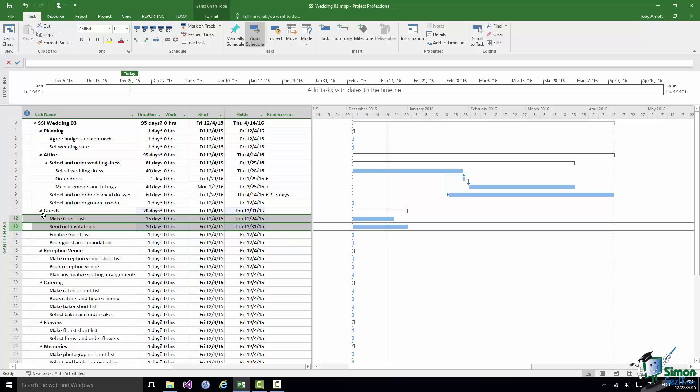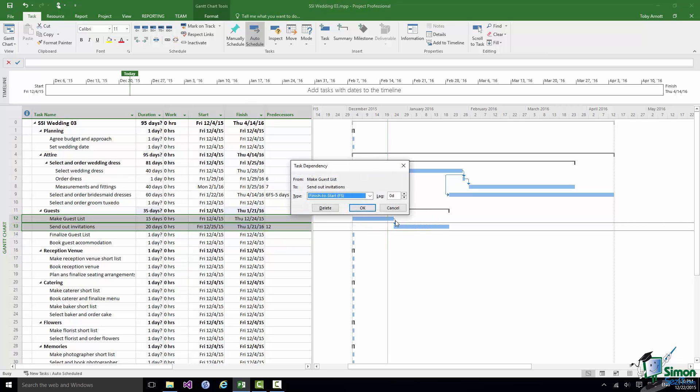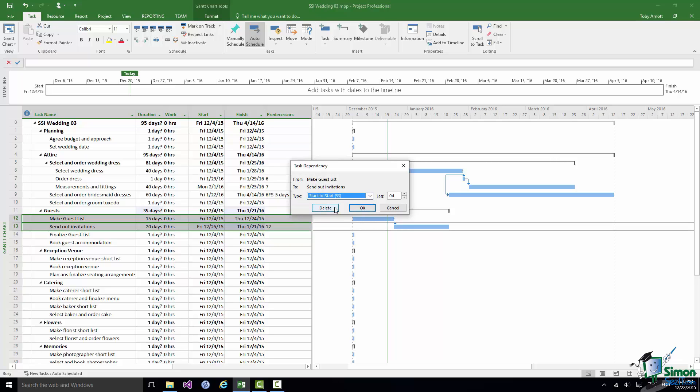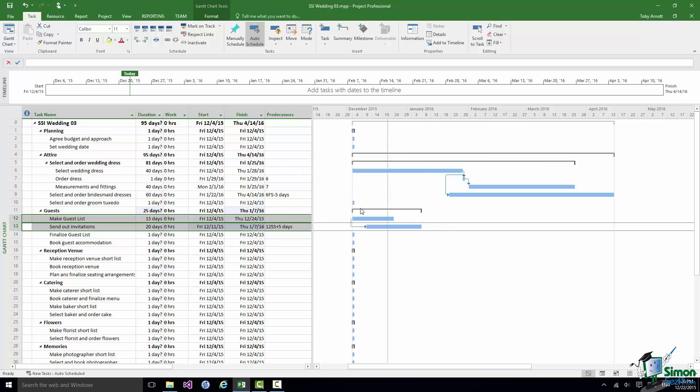So we'll link those two and then what we're going to do is change that dependency from Finish to Start to Start to Start and put in a five day lag Start to Start.